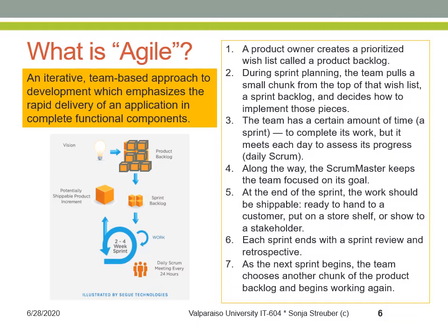So far, things don't really seem all that different from traditional activity duration estimates, right? But then the magic happens. Then the team, in collaboration with the product owner, determines, based on the priority and their estimates, how many of these user stories can be developed in a 2 to 4 week sprint and deliver a workable product.